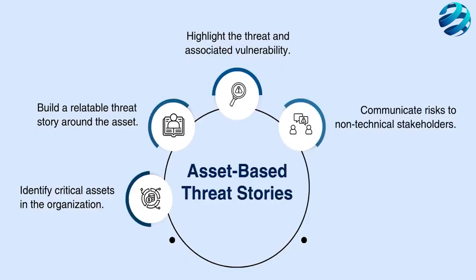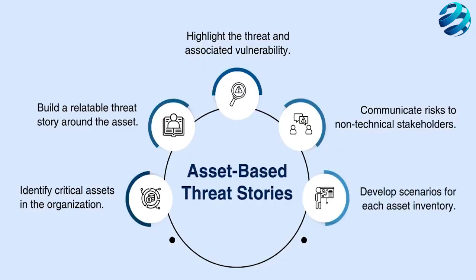By framing risks as these simple, relatable stories, you make them easier for non-technical stakeholders to understand. This approach allows you to systematically work through your asset inventory, servers, databases, mobile devices, and develop specific threat scenarios for each, forming the foundational entries in your risk register and connecting technical weaknesses directly to tangible business assets.